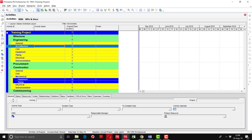Defining activities is the process of identifying and documenting the specific actions to be performed to produce the project deliverables. In this process, the work packages are further broken down into activities or tasks. The resulting project document is called the activity list, which includes all activities required for the project in sufficient detail for others to understand what has to be done.